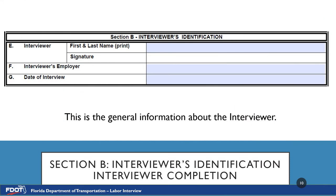Section B is the interviewer's identification — general information about the interviewer. Once interviewing, please fill out your first and last name, sign, fill out your employer, and the date of interview. Please refrain from pre-filling out the form and putting an anticipated date of interview. If this date of interview is missed and the form is still utilized, it can cause discrepancies when trying to match up the interview, the payroll, and the daily work report. So please make sure that the correct date of interview is entered.